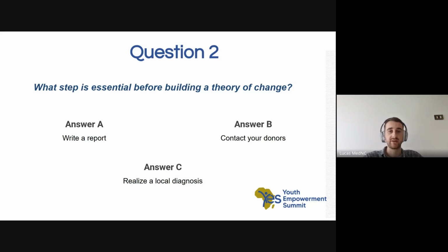Okay, yeah, that's good. Yeah, C. Okay, great. Yeah, so the answer was realize a local diagnosis, because without diagnosis, the theory of change will hold on hypotheses that are non-verified. So yeah, that was the right answer.